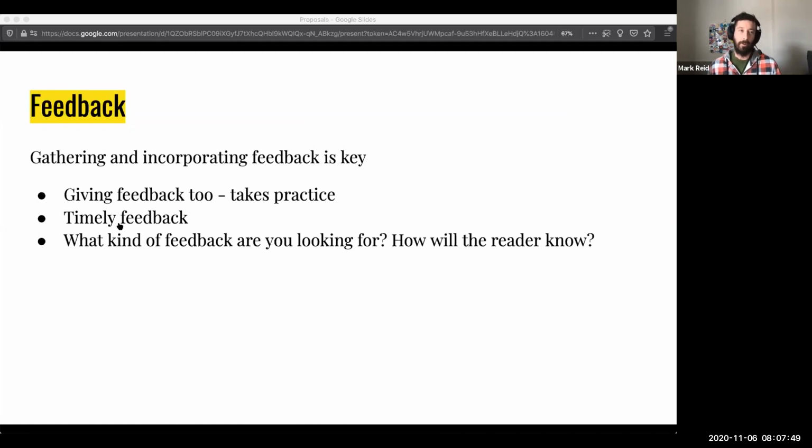And another important part of good feedback is that good feedback is timely. We've had good luck by time boxing requests for feedback to give a deadline by which we would like feedback. So it's not just like, yep, I'll get to that eventually. It's, I need to get to that by the end of next week or so forth, something like that.